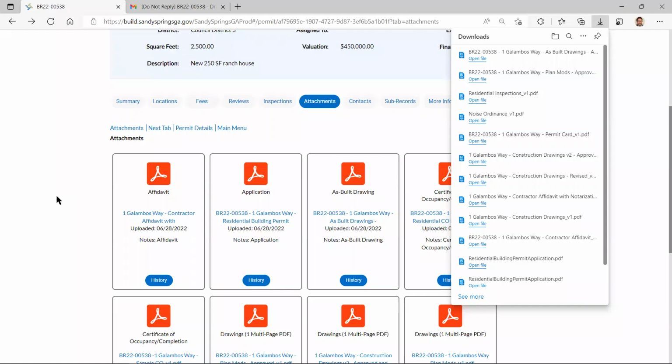Yeah, so, okay, so I cannot issue a CO until the project is entirely approved and passed. Some things that we may consider a temporary certificate of occupancy would be something's on back order, right? Or maybe we installed the wrong window in the bathroom. It wasn't tempered glass, all right? It happens, all right?